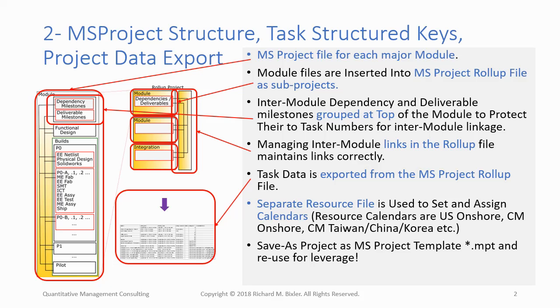Then back in the Resource Pool Resources sheet, add resources via ribbon Resource, section Insert, Add Resources, a pull-down, Work Resource. On each line in the resource sheet, add resource placeholder names such as Company US and identify each appropriate calendar for that name, such as Company US, using the pull-down in the field named Base Calendar.